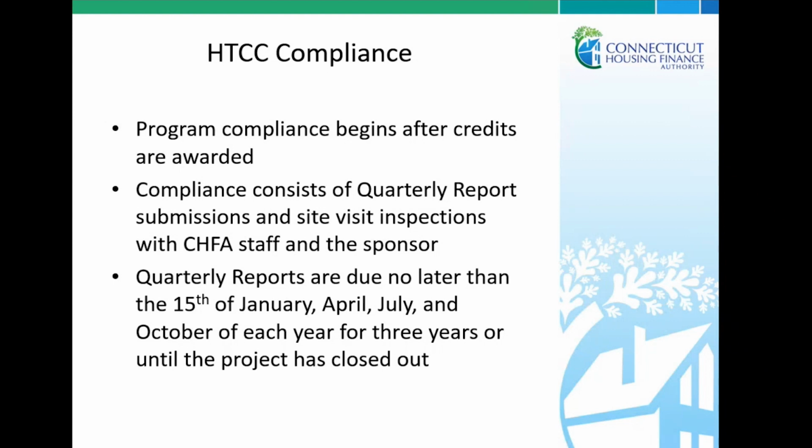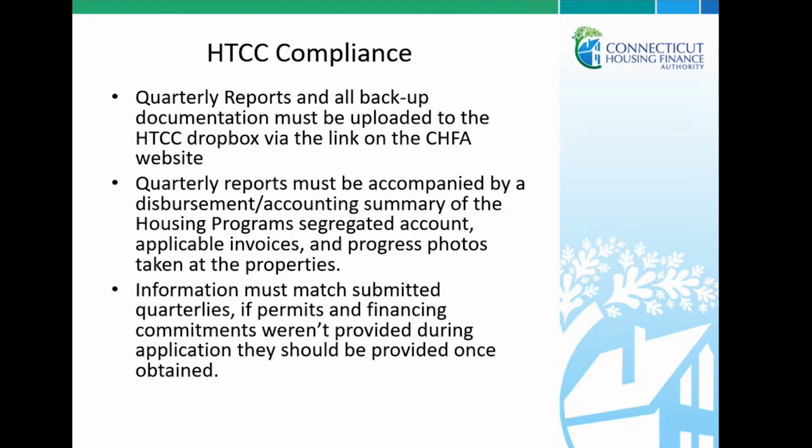I do recommend having a calendar reminder just so you can maintain the deadlines for each quarterly report. Quarterly reports and all backup documentation must be uploaded to the HTCC Dropbox via the link on the CHAFA website that was explained by Colette earlier in this presentation. Quarterly reports must be accompanied by a disbursement and or accounting summary of the housing program segregated account, any applicable invoices, and also progress reports. Progress photos taken at the properties.